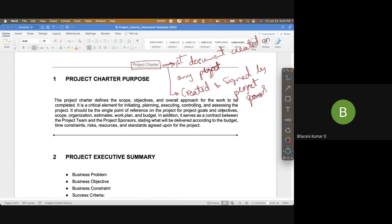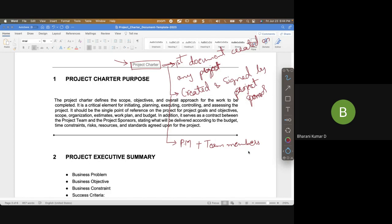That's the ideal scenario, but usually the project sponsor will say, 'Project manager, please can you prepare this document?' So the project manager, in collaboration with the team members, would create the project charter. It is recommended that you include the project manager and team members during project charter creation even if it is created by the project sponsor.